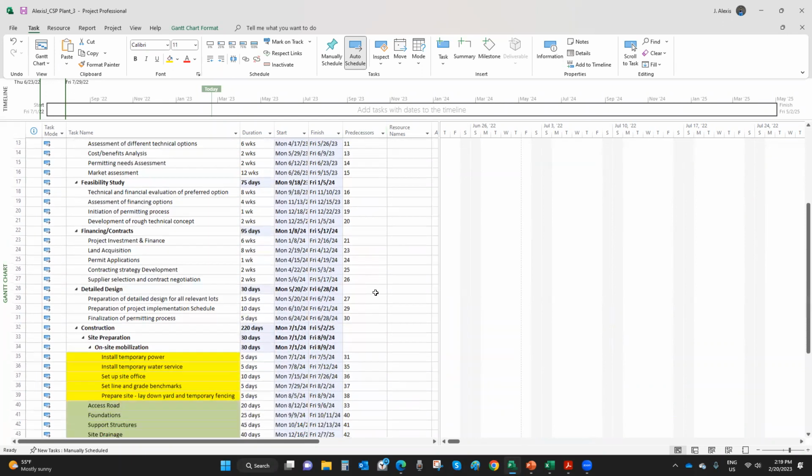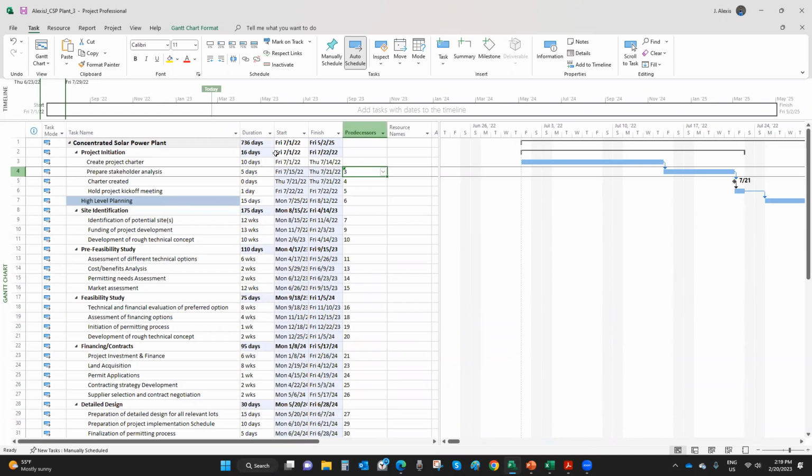Let me know when you're ready, because as you can see here, the project duration changed from 690 days to 736 days. Now, there are dependencies or task relationships between my project activities and deliverables. That's what has caused that. Now, I'm waiting for everyone to see whether you all found 736 days. If you have a different result, it is because of some differences in the task hierarchy.